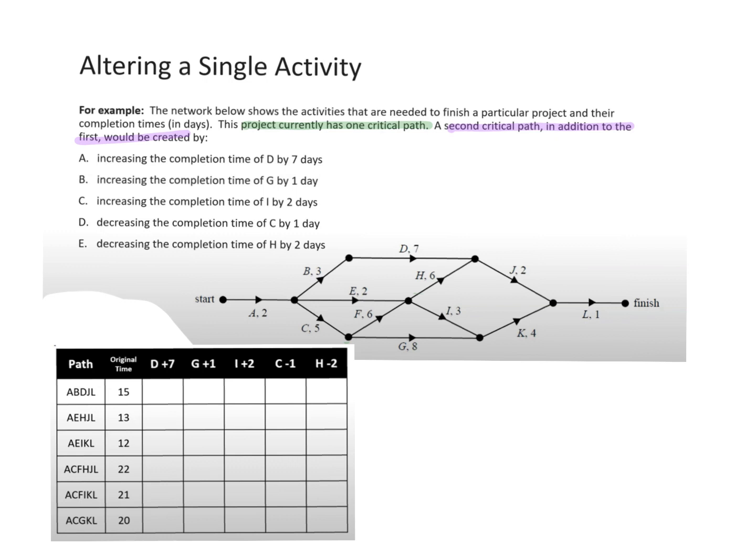So what we need to do is we are going to do all our options. So you can see we've put in all the options from start to finish. And then what we're going to do is test out their days. So I've put all the original times. So what would the critical path be in the original time? What's the length of it? 22. Good. So we've got 22 as the length of it.